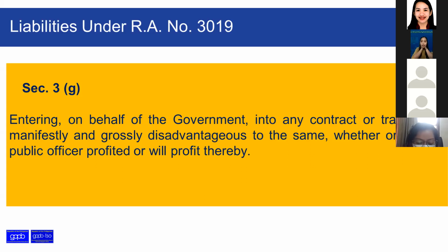Kinopya lang or isang lang yung tinitingnan. Hindi tiningnan yung ibang suppliers, anong possible price, SRP sa certain equipment or item. So, later na, naging overpriced siya. Kasi nga, marami pala sa market na 700 o 600,000 lang.